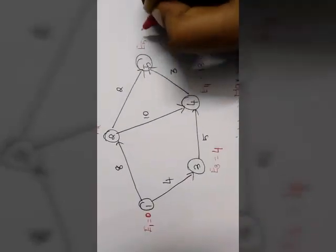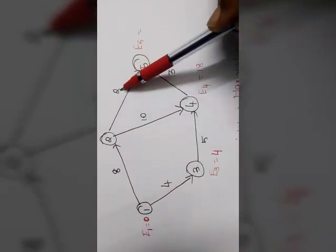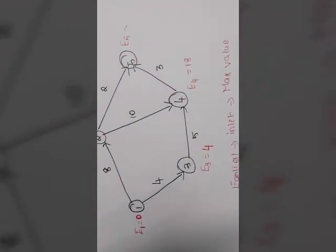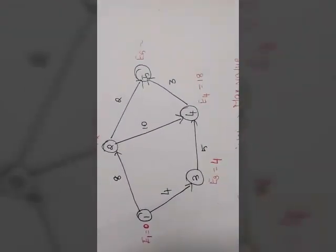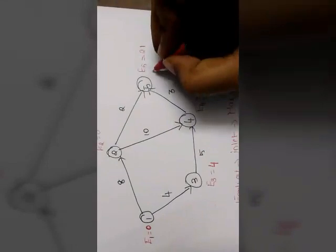So E5. For E5 also 2 inlet is there. 8 plus 2 is 10 and 18 plus 3 is 21. 18 plus 3 is 21. So 21 is maximum. So 21 will be your latest time.